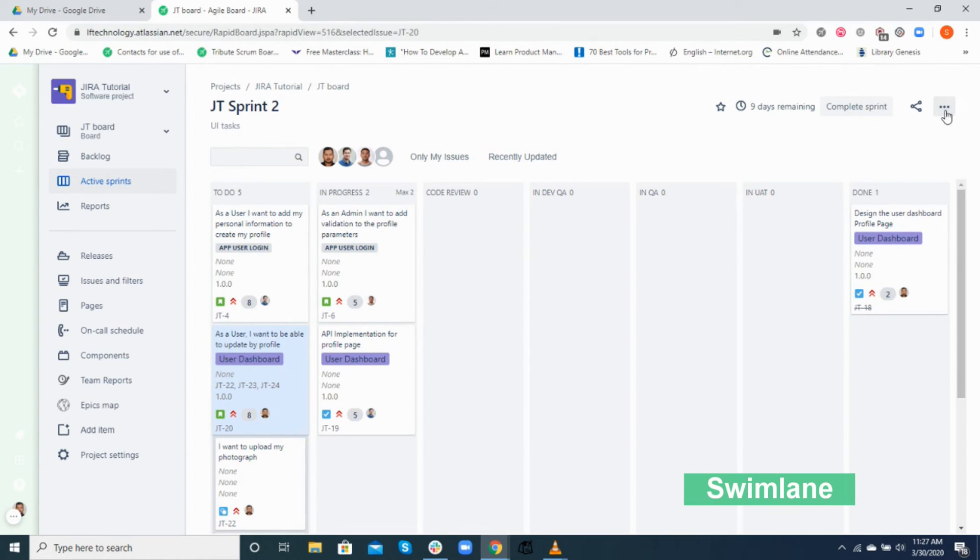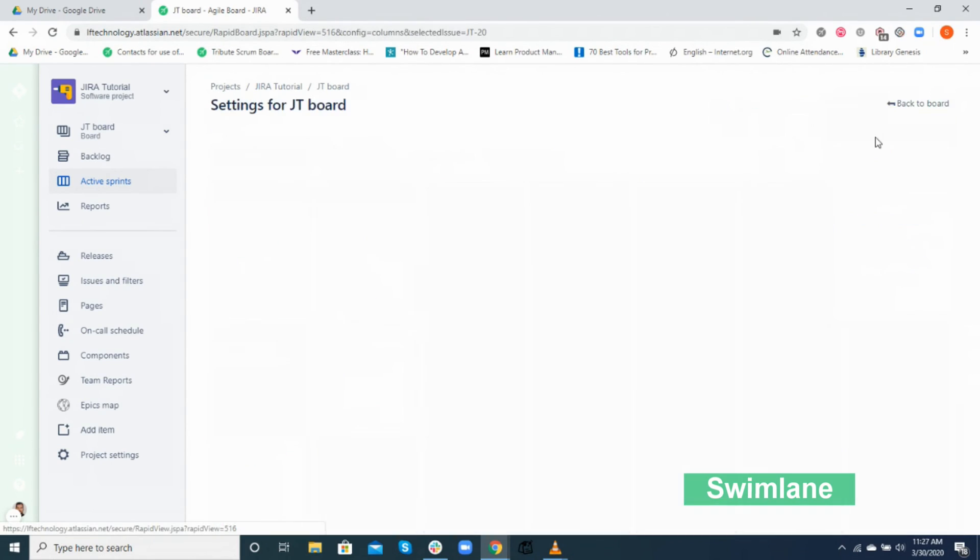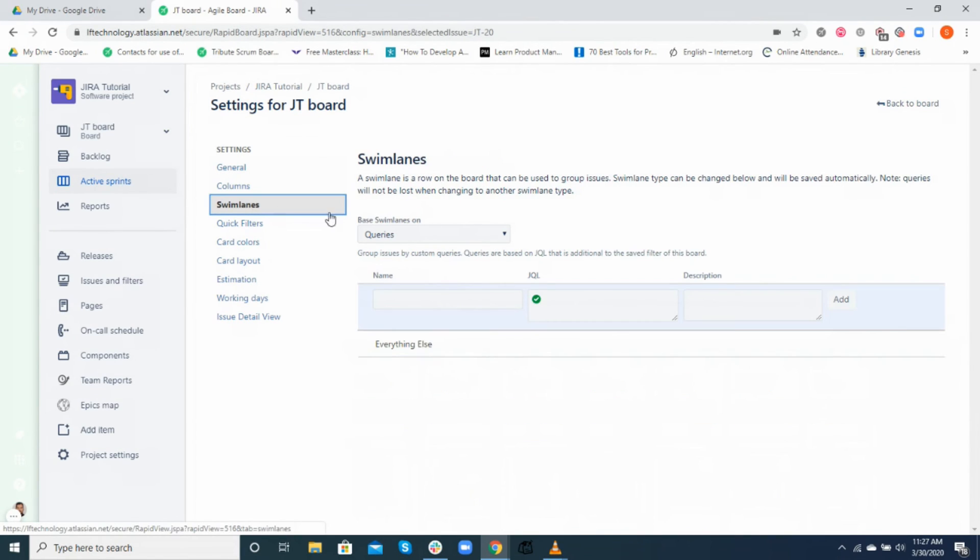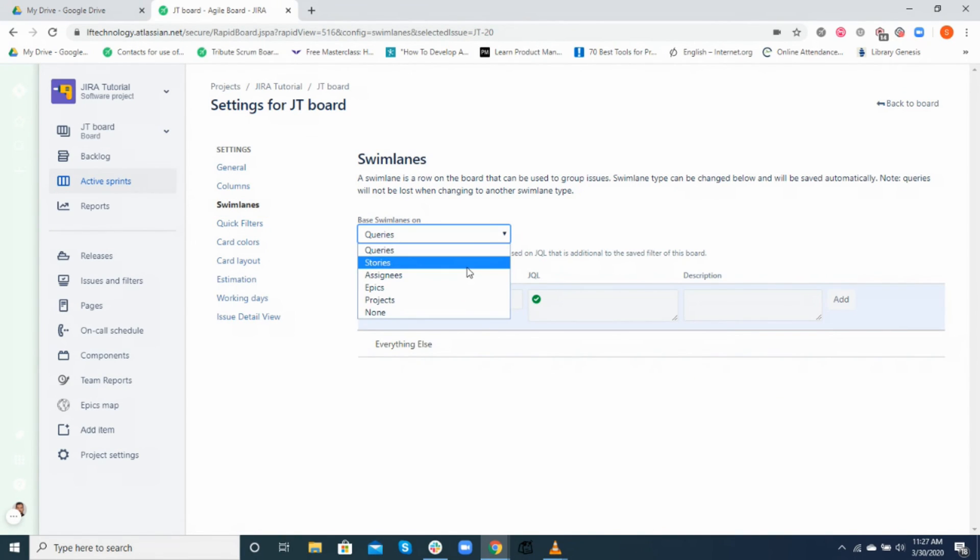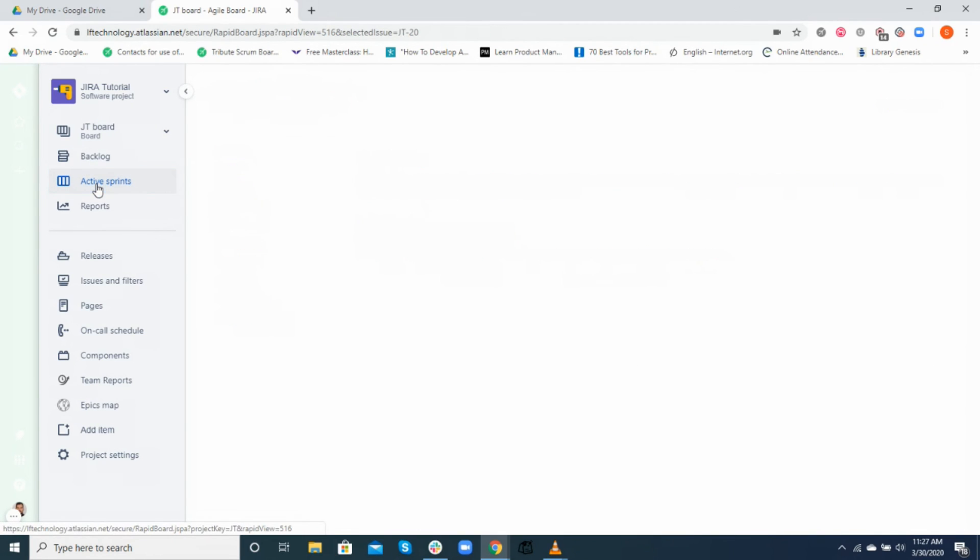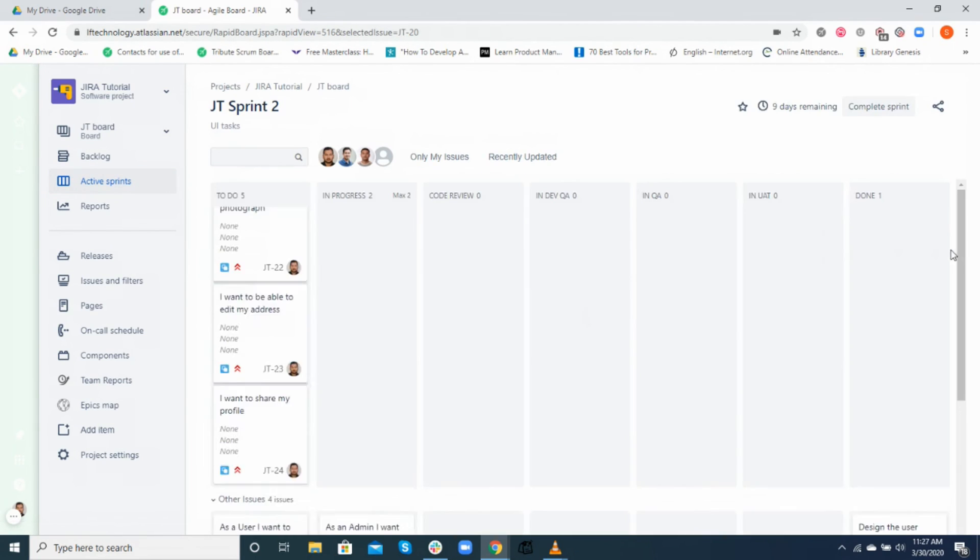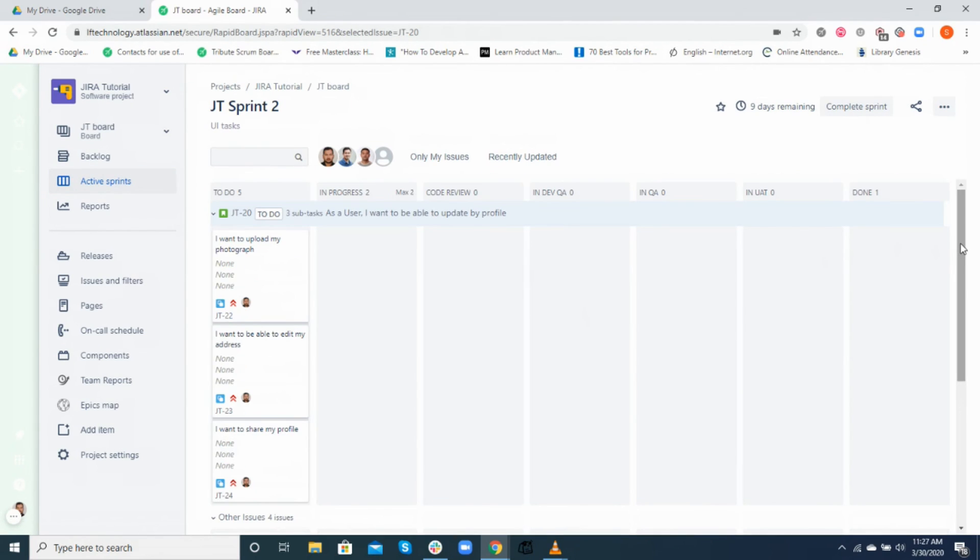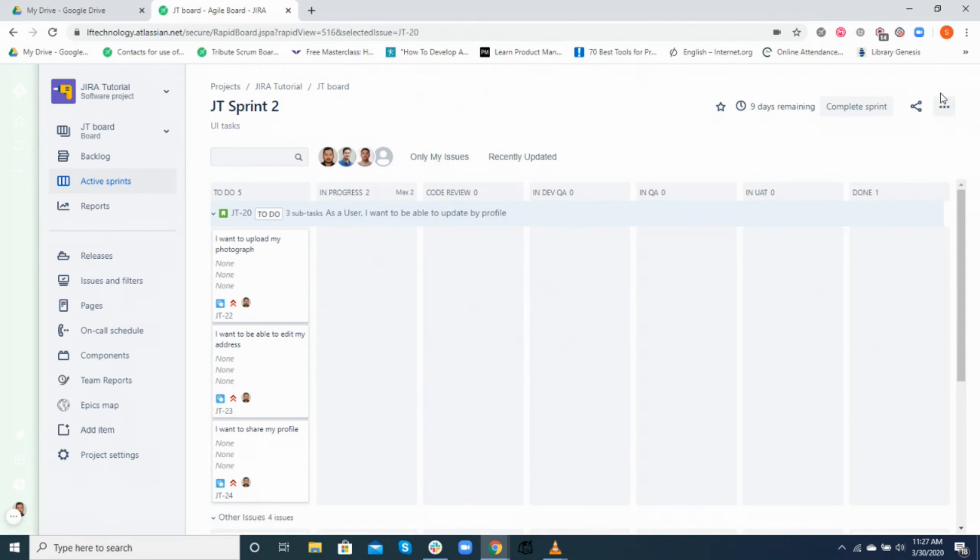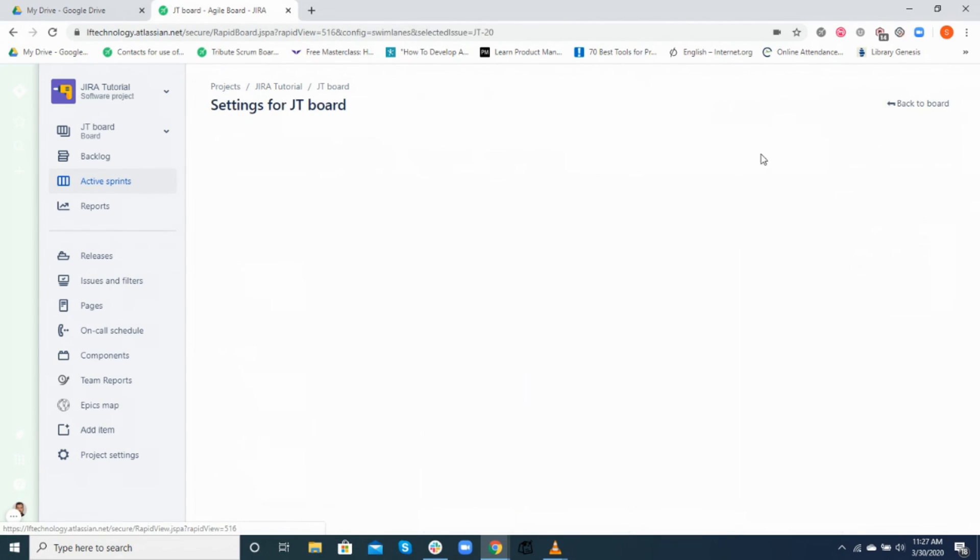All right, let's move on to understanding what is swim lane. Now a swim lane is a row on the board that can be used to group issues and helps in task visualization. In general, swim lanes are usually based on stories, epics, or assignees. If it's based on stories, the primary task displayed would be a user story and the subtask would be shown inside the main story task. You can transition the subtasks through various stages of the workflow, and once all the subtasks have been marked as done, the main story would automatically be marked as done as well.